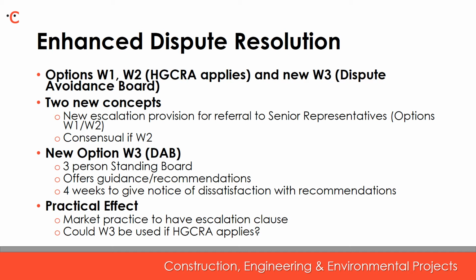Options W1 and W2 under NEC4 also include the option to refer disputes to a senior representative of the parties prior to and appointment of an adjudicator. And this is mandatory where dispute resolution W1 is said to apply. So this is most likely to be relevant in international projects, for example, in the absence of applicability of the Housing Grants Construction and Regeneration Act 1996, that of course introduced and pursuant to which adjudication is undertaken.